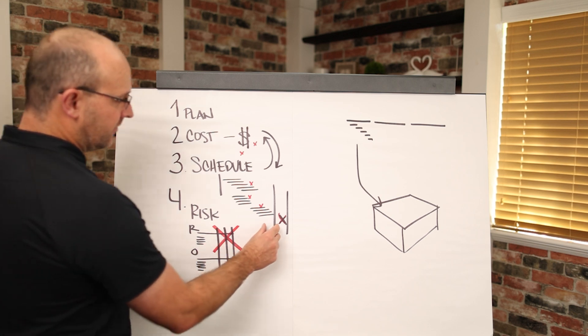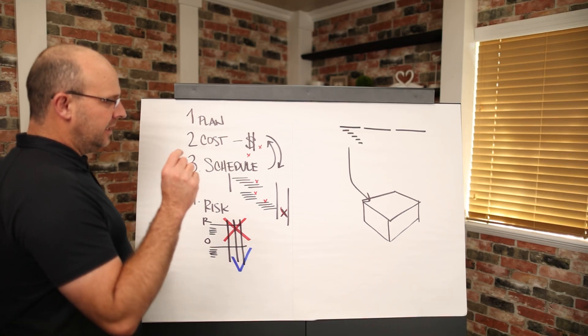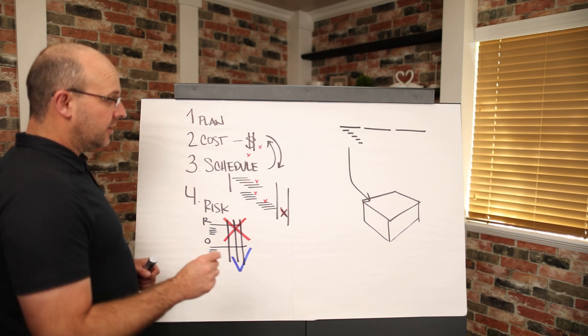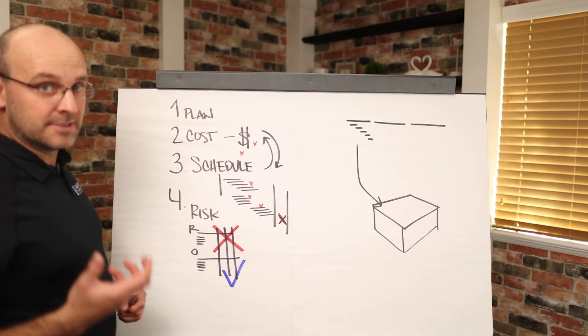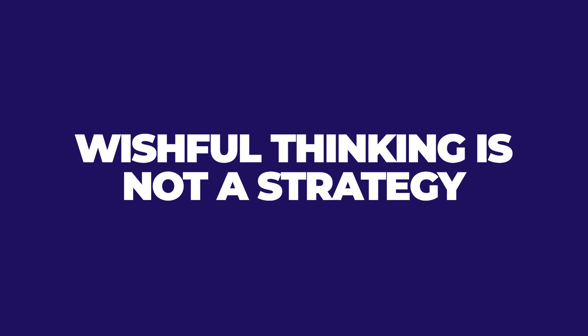No, it either has to be covered in contingency, financial and schedule. It has to be planned around so it doesn't happen and monitored, or it has to be accepted as a fee loss, which isn't going to happen. Wishful thinking is not a strategy.